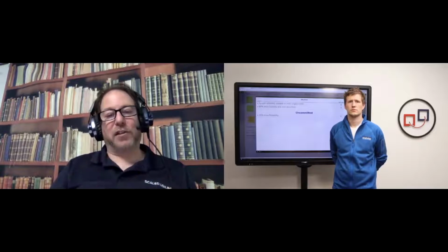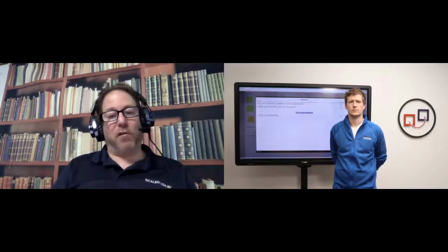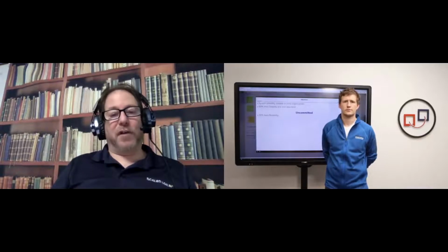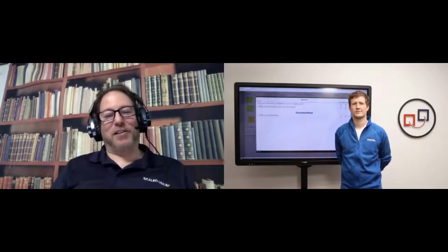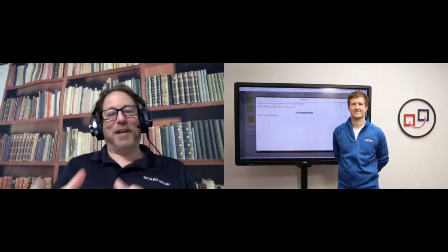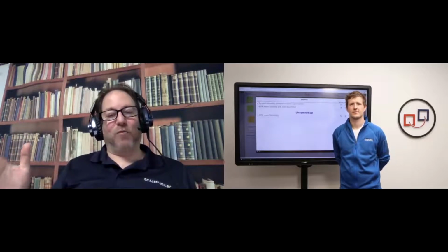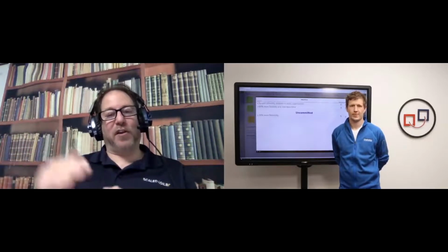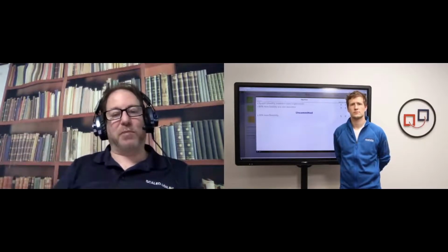Now, in other cases, you might not need as much business context. So it could be a shorter period of time. And the same thing holds true in person. Often we don't give enough time for the team breakouts, and one of the things you want to avoid doing is having an all hands meeting as part of your PI planning. PI planning is meant for PI planning. It's not meant for other stuff that is not relevant to the PI planning or the work that you're doing. For example, maybe it's okay to introduce new development practices that you want to do over the next PI, but it's not the time for an all hands meeting.